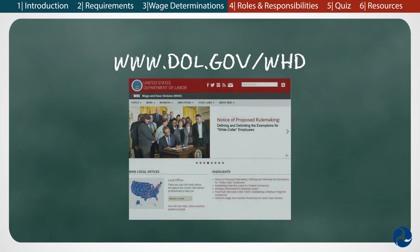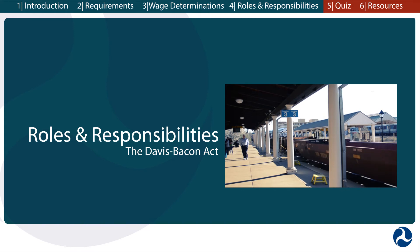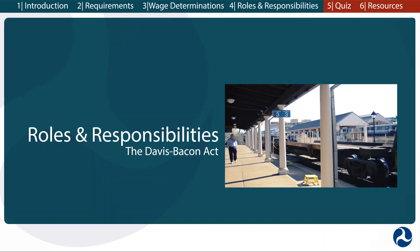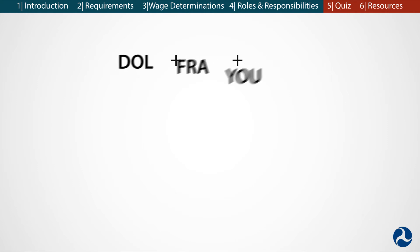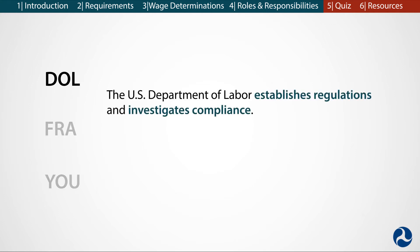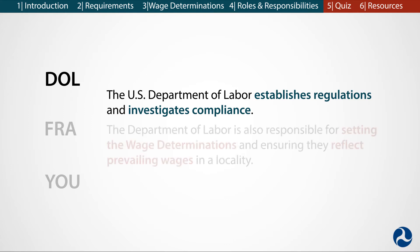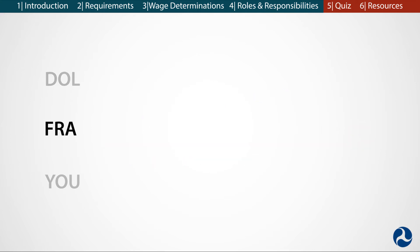Project sponsors can contact their FRA grant or loan manager with questions. Now that you know the requirements of the Davis-Bacon Act and the basics of wage determinations, let's discuss the roles and responsibilities for ensuring compliance. There are three major roles in ensuring DBA compliance. There is a large federal role in ensuring that the Davis-Bacon Act is followed. The U.S. Department of Labor is responsible for the DBA regulations and investigates DBA compliance issues. The Department of Labor is also responsible for setting the wage determinations and ensuring that they reflect the prevailing wages in a locality.